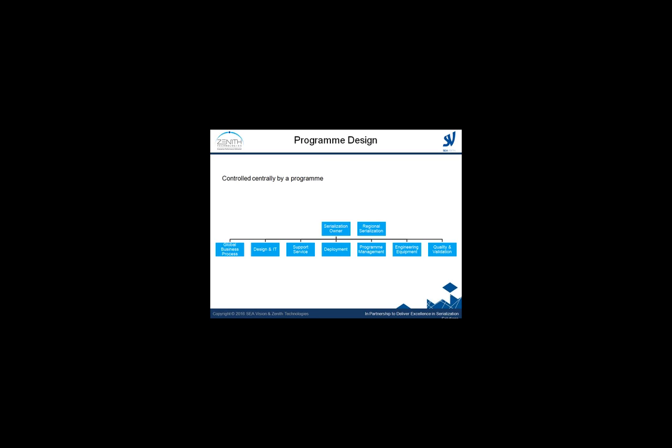You'd like to have a business process team who are going to push business requirements onto the design and IT team, who are going to manage the changes, the initial design, and they're going to manage the changes for future releases to meet ongoing market legislation. Support service, so they're going to come into the picture as your production lines start coming online, producing serialized batches. A deployment team, good to have a dedicated team ensuring consistent, reliable deployments to your manufacturing sites and lines.